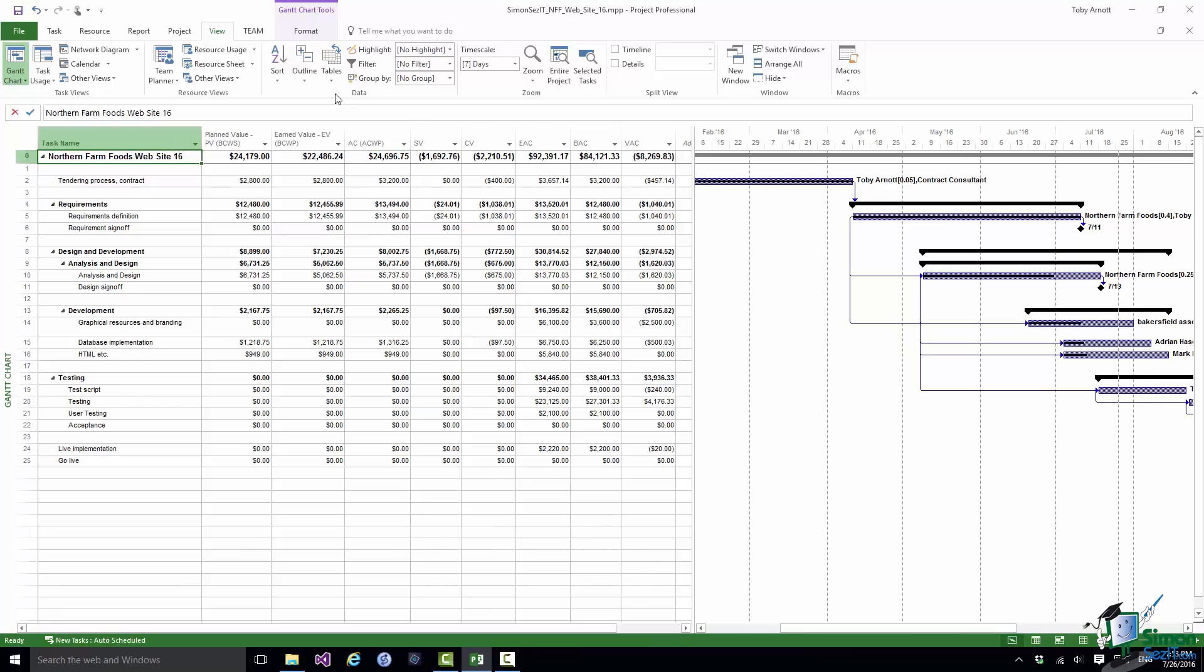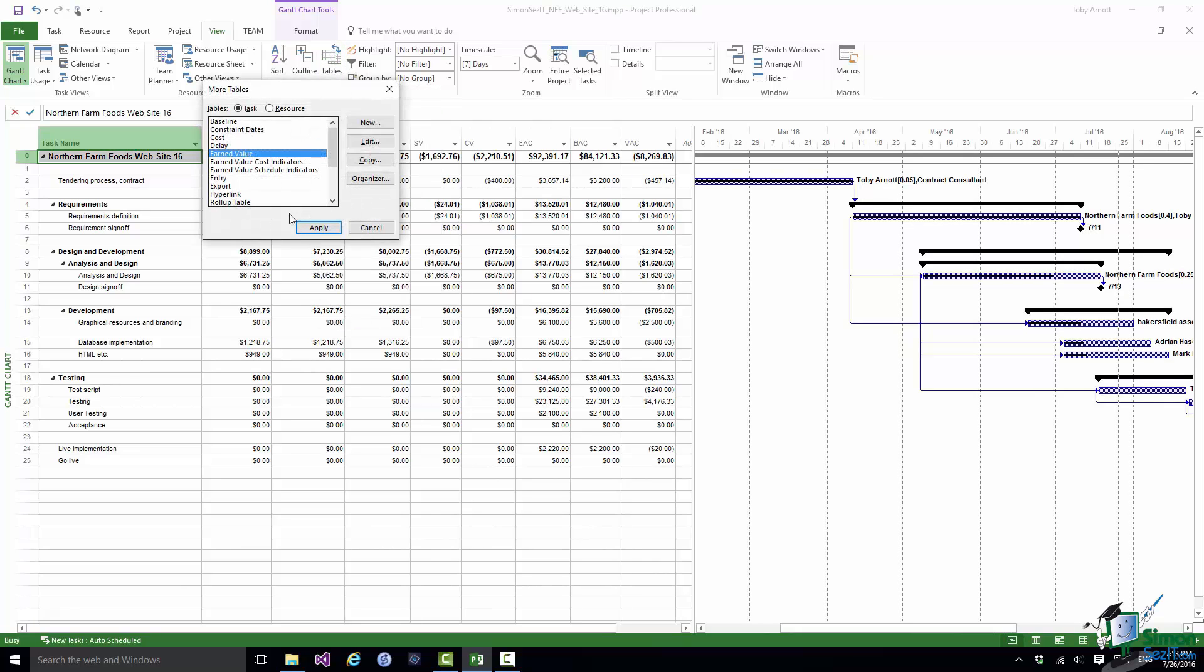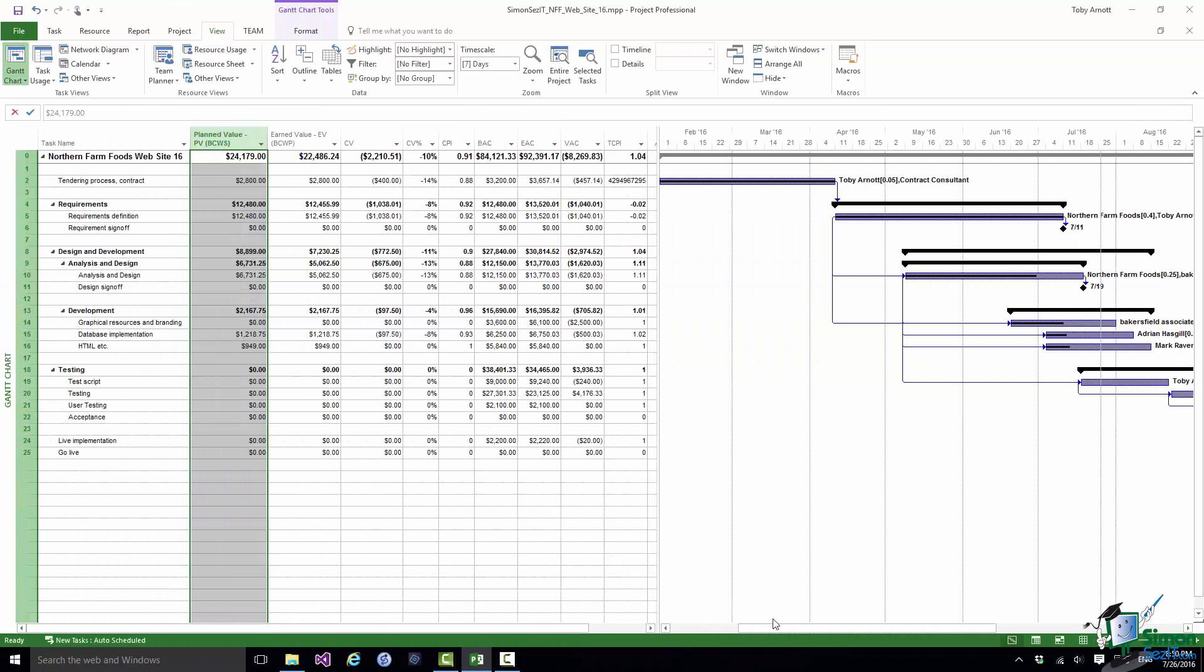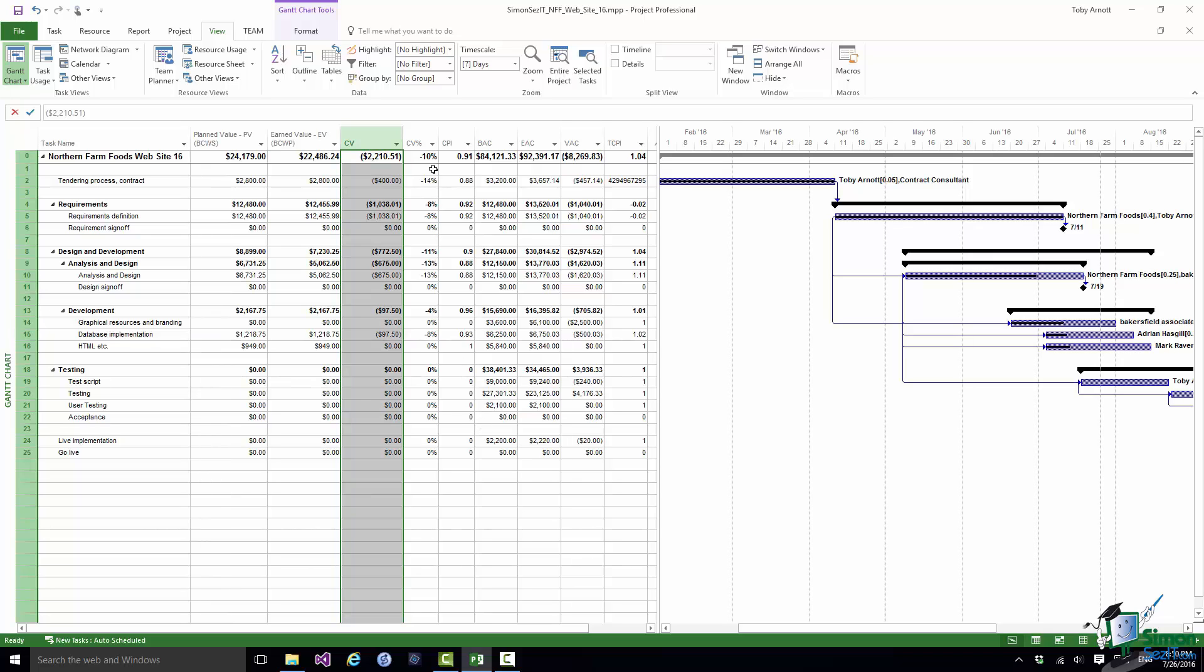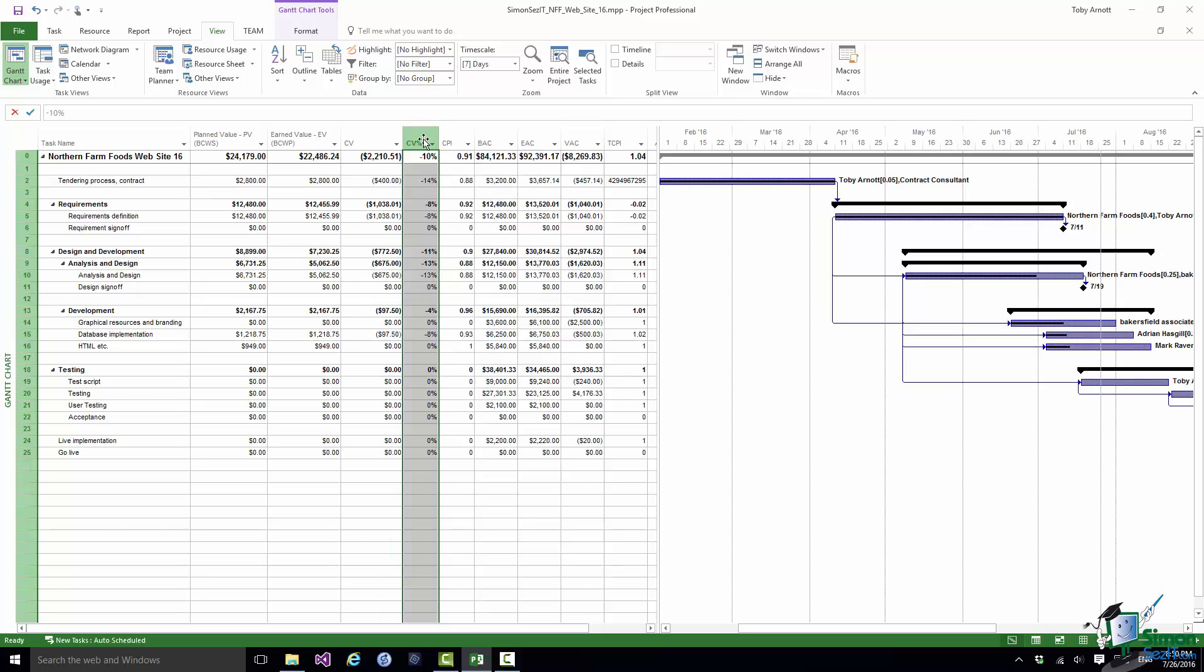Now let's take a look at one of the other earned value tables. Let's look at earned value cost indicators. So in this table by default the first two columns are PV and EV. Then we have CV and then we have CV percent. And CV percent contains the ratio of cost variance to budgeted cost of work performed expressed as a percentage. Now this is a very useful statistic as well because whereas with a figure such as CV equals minus $400 for instance for task two it's useful to be able to put it into some kind of perspective. What does that minus $400 represent as a percentage of the value of the task? Now in this case it's 14% of the value. So that's quite a significant amount.